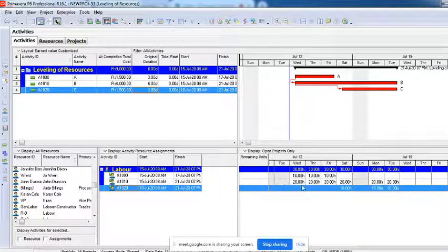because on these 3 days the resources are not available, so it is pushing it here, delaying it here. On the days when it is available, here it was under allocated. Early it was 20, 20, 20. So on Saturday, Monday, Tuesday, where it was under allocated, the activity got pushed here, so that now it's equally allocated on all the days.